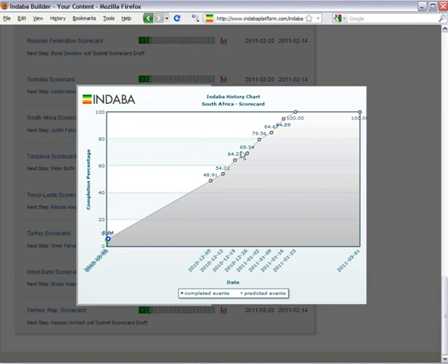It also gives you one piece of information through these projections that I think managers will find very useful, which is that it's got a projection based on the estimated due dates of all of these projects. It's got a projection of when that piece of work is actually going to be done. Especially towards the end, you should have a pretty good sense of how long things take to complete. And then from that, you can use this to answer the question of, is this document going to be ready by the time our whole project publishes?